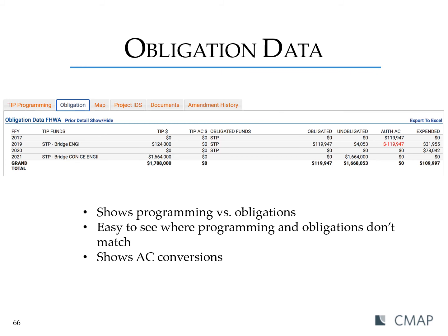The fund source in the obligated funds column may often be different from the TIP programmed fund source, as there's not a direct one-to-one match from FHWA's buckets of money to ours, and the state has flexibility to use any eligible source. They often substitute funds in order to use up older funds first, or to ensure that Illinois is not vulnerable to federal rescissions of any fund source. Programmed fund sources in the TIP should not be changed if a different source is obligated, unless CMAP staff instructs the programmer to do so.